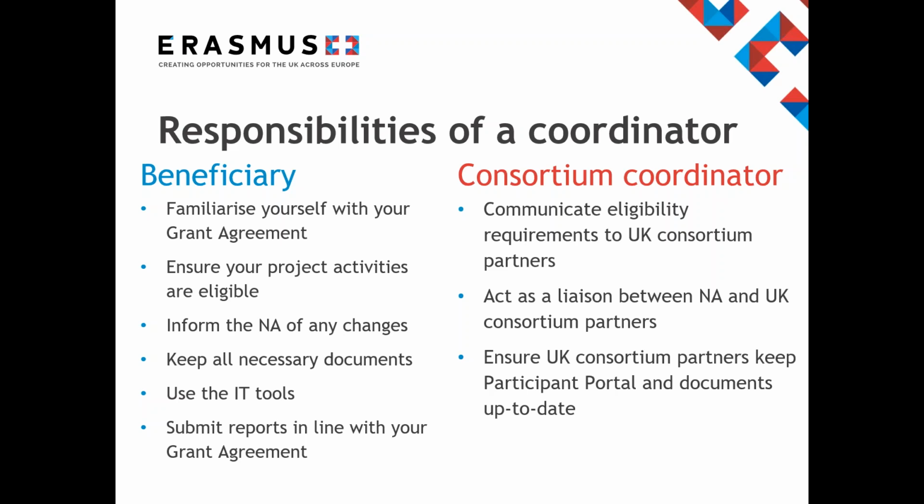You must ensure that your project activities are eligible. If in doubt, please read the Handbook Guidance 2020 Erasmus Programme or contact your project officer. You must inform us of any changes you wish to make regarding your application form, as some of them may not be eligible, in which case funding provided cannot be used to cover them. You need to keep all necessary documents. All documents related to the project, invoices, and agreements between participants and yourself need to be kept in the event of a desk check or if the national agency requests them at any point.